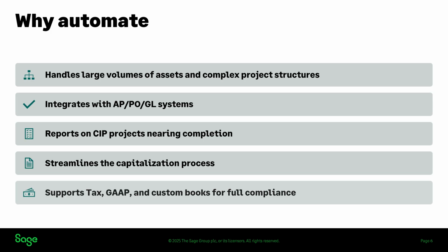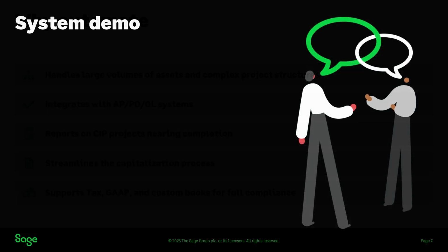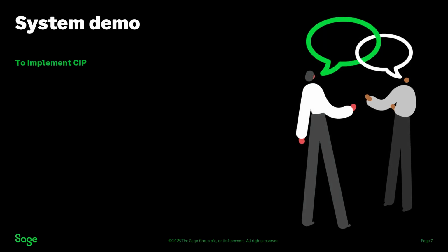And if you don't know the line item number in which the asset sits, every project starts with a pending line item, which is 999, which I'll show you soon. And a lot of times, most of the time, just to get the data in, right, especially if you're high volume, just send it over into each project at once into the pending line item, because then it's there and you can start running reports against the pending just to see where everything's at.